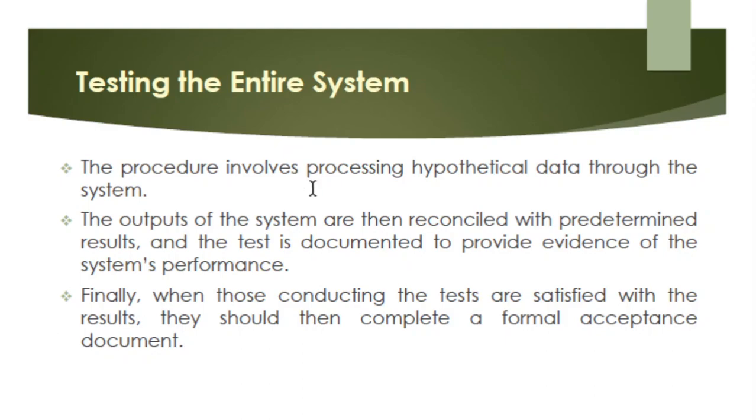So you run a test from the starting input data down to the processing and then down to the output or the reports that will be generated by your system. Now, the outputs of the system are then reconciled with predetermined results, and the test is documented to provide evidence of the system's performance. So if there are discrepancies, meaning you can assume that there is something wrong with the system.